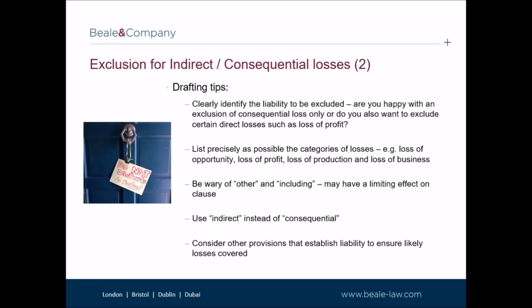Use the word indirect instead of consequential to describe the loss. Commercial parties are clearly more likely to understand the clause if you do. And be alive to the other provisions of the contract, particularly those that establish liability, so that any exclusion clearly covers the likely losses. Every contract should be construed as a whole.